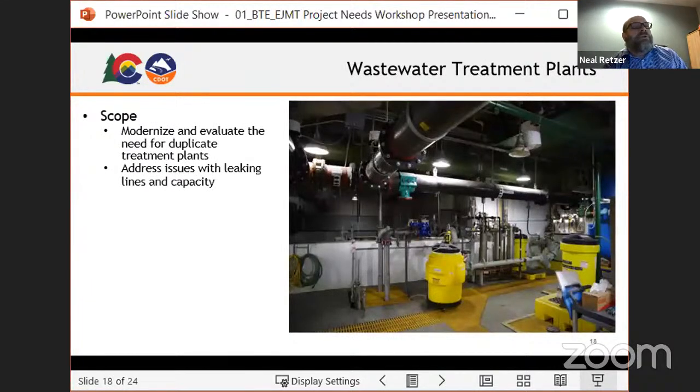Water treatment plant. I know we're doing some of it with the plumbing project that I mentioned, but this is kind of the next round, the less emergent things that need to happen. Plus, we'd also have to redo some of our permits with Department of Health. So that's going to take a couple years if we do this project. So that's why this one kind of got put on the back burner, not included in the previous $24 million project. Next slide.